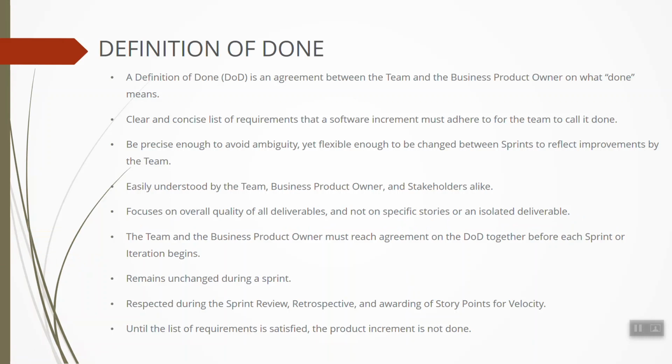It cannot be changed within the same sprint, but you can allow things to come in. During the sprint you might realize there could be one more point that could add to our definition of done. Fine, that could always happen and it's flexible, but you can record that and take it in a future sprint.